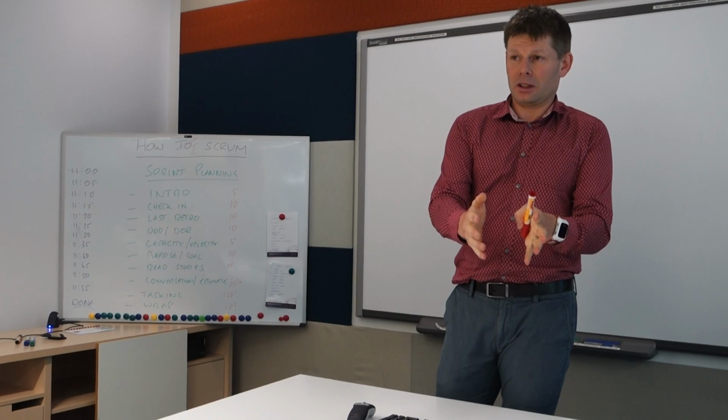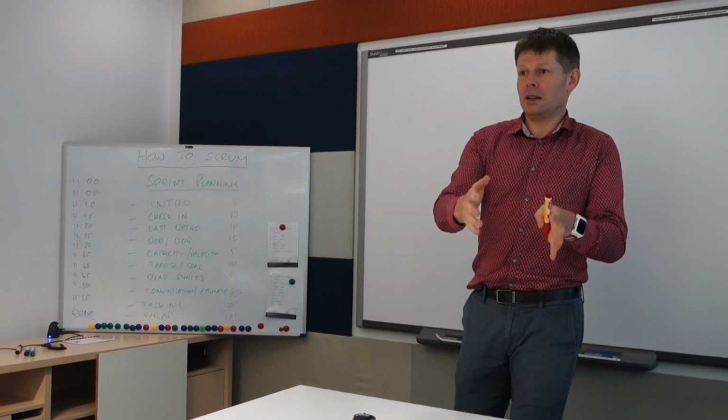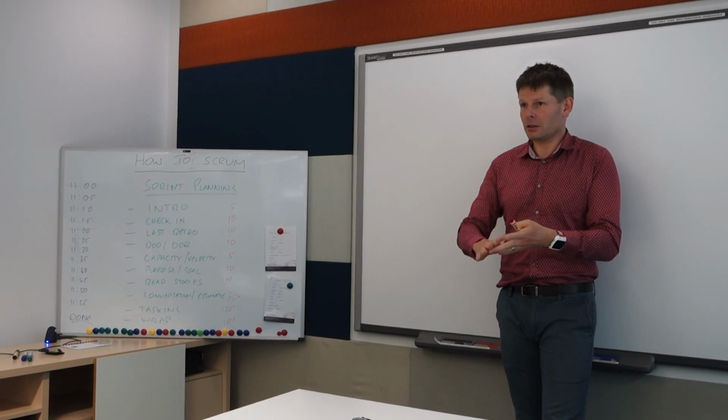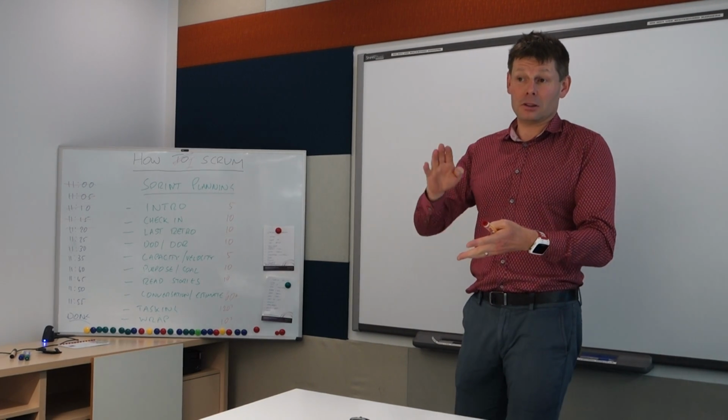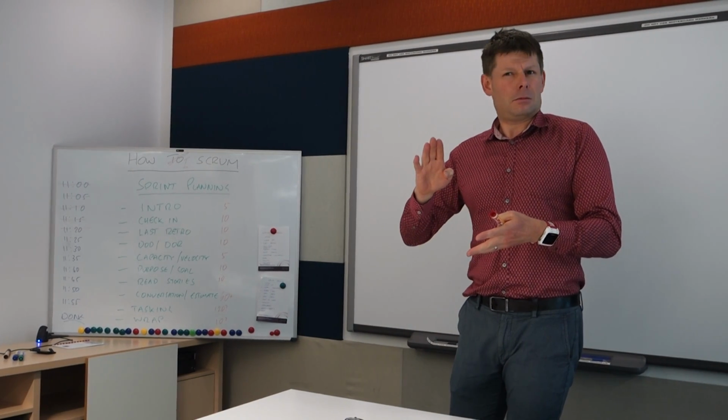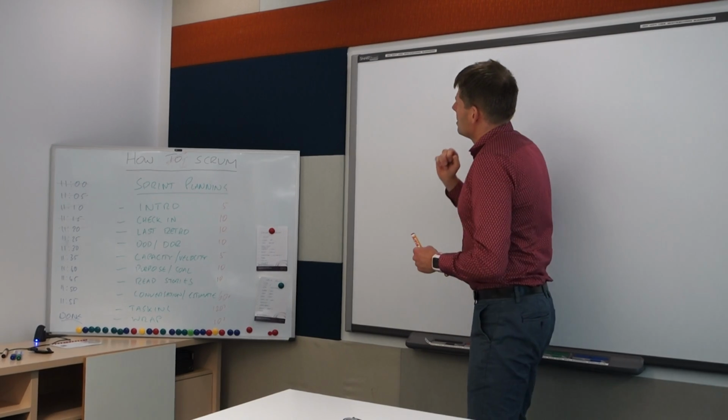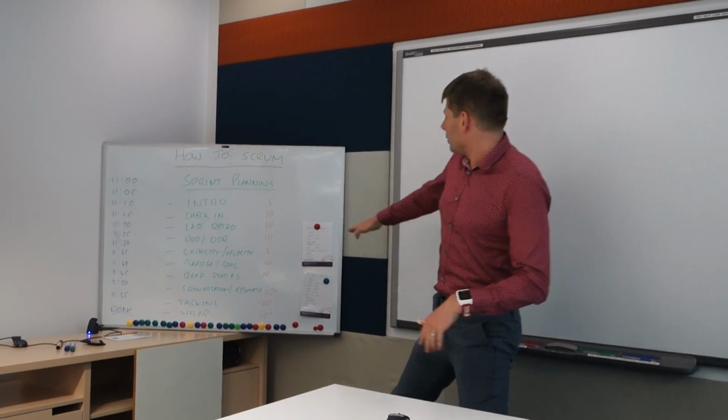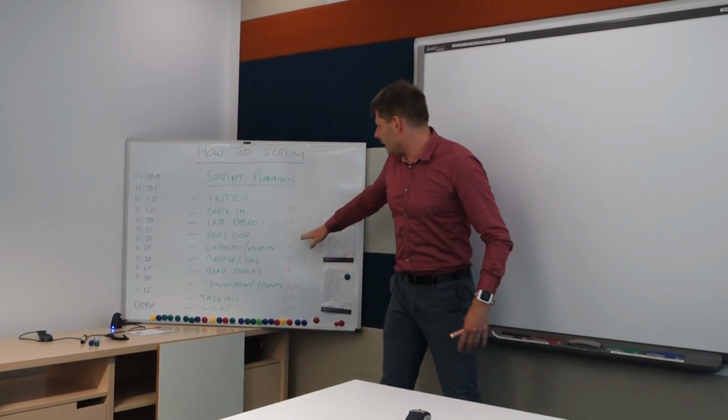And the stories that we did in backlog refinements, do they meet definition of ready? Are they independent, negotiable, estimable, small, testable? That's INVEST, isn't it? It is. Yeah. So that's definition of done, definition of ready. Don't always do that, probably will today.